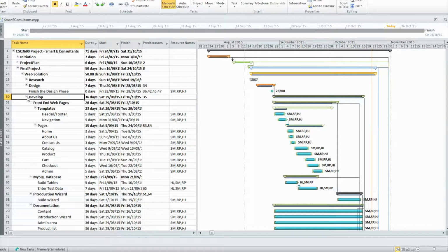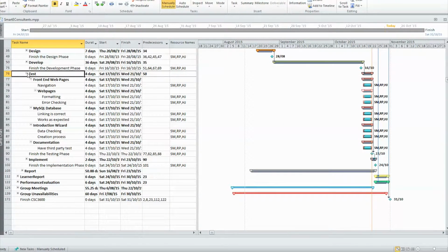The process to have the web solution completed by the scheduled date was delayed, however. Instead of being completed by 16th of October, it was completed on the 21st of October. The reason for this delay is due to issues encountered with the development environment server, Git, and struggles with Flask and SQL Alchemy. Because of this, the time period to conduct full testing has been limited.